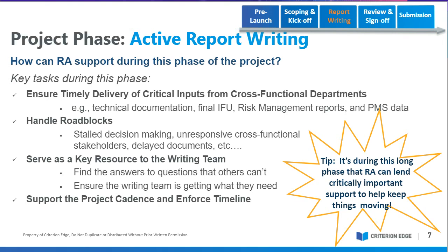The IFU, if it's being revved, which is never a great plan, if the IFU is not final when you kick off this project. If it needs to be revved or finalized at some point after the writing has kicked off, I can tell you that the writers have already written quite a bit of information that's in the IFU, and the longer you go before saying, oh, we have something in the IFU that needs to be fixed or altered, that could literally create a day's worth of delays in your writing project, because the writers are going to have to go through the CER draft and pick out every spot where they mentioned that part of the IFU that is now being changed.